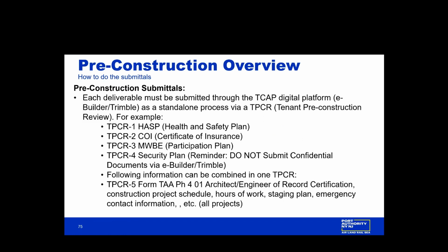The following information can be combined into one TPCR. You could submit your PH401, your architect engineer record certification, your construction project schedule, your hours of work, your staging plan, your emergency contact info, etc. Everything that's related to the project you can submit under the one process.